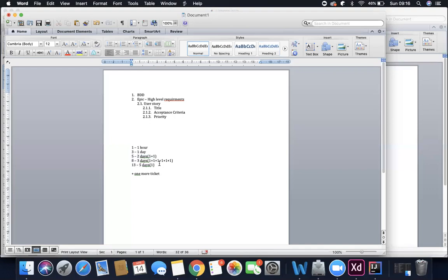Maybe eight is sufficient. So somebody changed their mind. This is exactly what the Scrum Master wants to discuss. Okay, very nice. Now, Charan, you're assuming on development. Example, development has taken 1.5 days. Then will you change your mind? If they take 1.5 days, I'll be left with 3 days, isn't it? No, you will be left with 1.5 days if it is 8. But if it is 5, then you are saying the development is 1.5 days and testing is 3.5 days. Now we can finish it before that. Yes, so that's the reason why I will also put you in that pool.